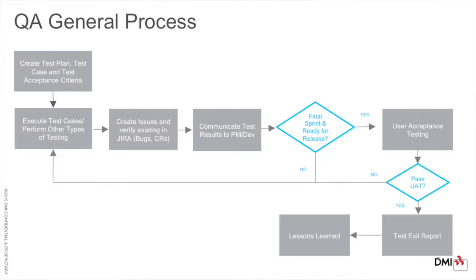This is later also used when you talk about guarantees and warranty and stuff like that. You can go back to what you agreed upon, which is in the testing scope. You don't promise you will support all versions of some OS or all phones. You have to be specific because it's going to protect you later on.